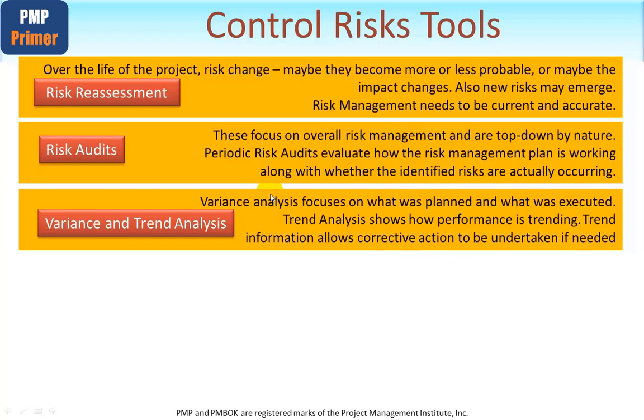Now, we are talking here about risks. So with regard to this tool within the control risk process, we'd be looking at trend analysis on risks. In the next and final slide, I'm going to show you how it's quite normal and natural that the total risks on a project are greatest at the beginning because nothing has been done about them. But as you approach the end of the project, risks will be minimized since we've carried out all of the activities, created the products, and there won't be too many remaining. Always some, of course, called residual risk, which we'll look at again in the next slide.